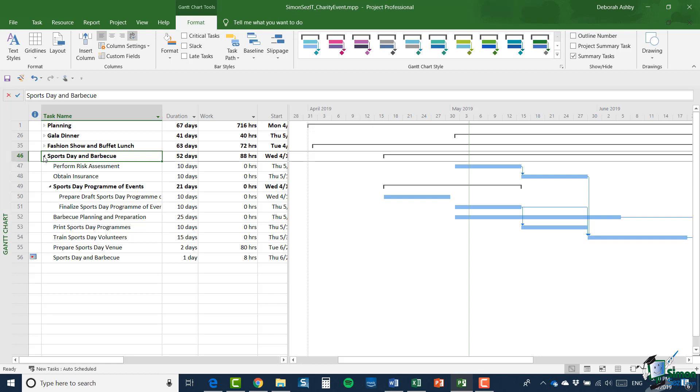And the way that we do this is to set up our four separate projects so that they share resources. Now, the added complication here, and again, this is quite typical, is that the four projects, although we want to separate them out, they are not independent. These projects have various links between them, and we need to make sure that these links are set up correctly, understood and respected by all of the projects.